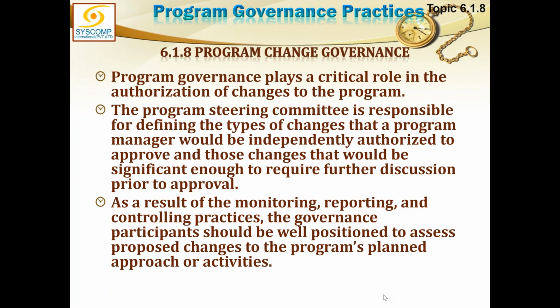Such changes would deal with, all the project managers are sending their project change request to the program manager because program manager is their sponsor. So program manager is authorized independently to approve or reject their change requests, right?